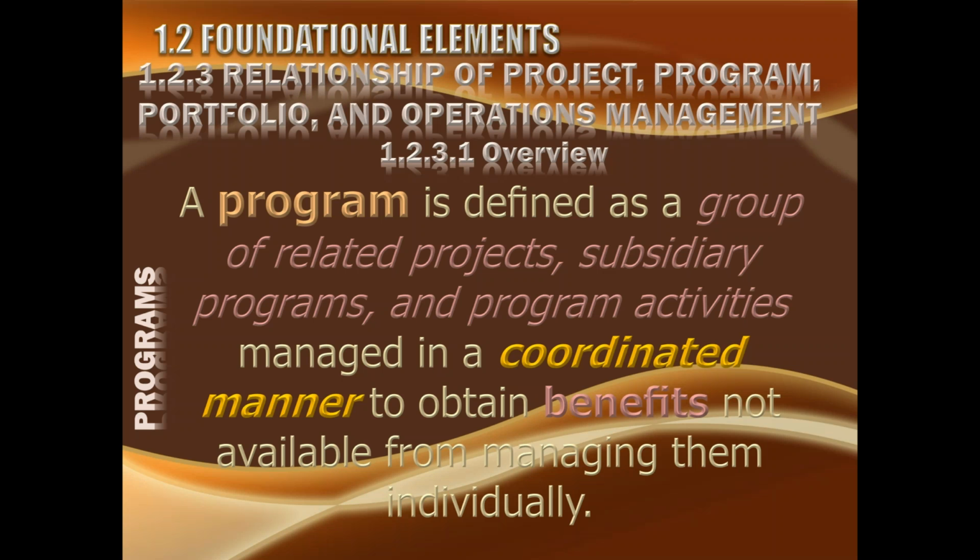So you can call it a kind of operation within the program, which is constantly looking after the output of the projects and converting it into ultimately the benefit. And this is managed in a coordinated manner to obtain benefits not available from managing them individually. You see, if there are 10 projects in a program and all of those 10 projects could have been done in a standalone manner, they could have yielded some output and they could have had their own benefit, but those benefits could never have been unified if they were standalone.